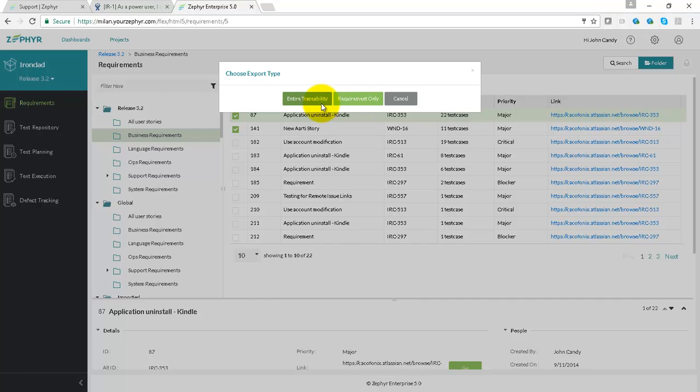The traceability report will show you all data for requirements linked to test cases, linked to cycle and phase data, as well as execution information and defect data. If the data for requirements and even for defects are being injected from Jira,